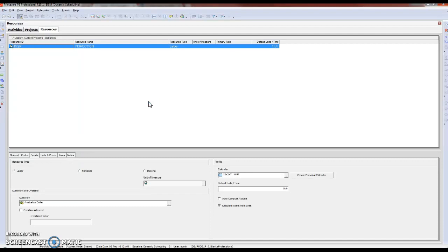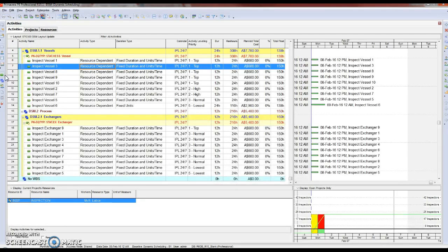We know they have permit time, safety time, JSA toolbox, meetings, paperwork, break times, wash up time, walking windshield travel time. So we're lucky if we can achieve 6 hours of direct tool time on any particular 10 or 12 hour shift. And I'm going to show you how that works when we go to do the scheduling.